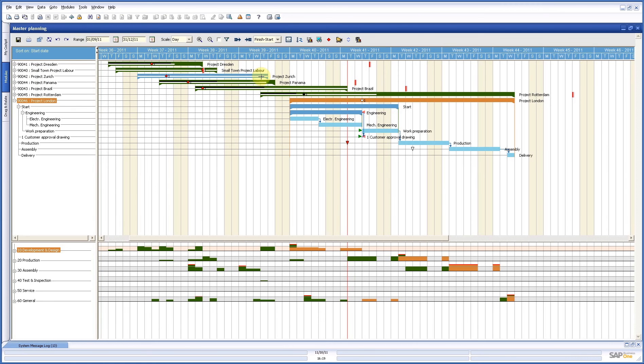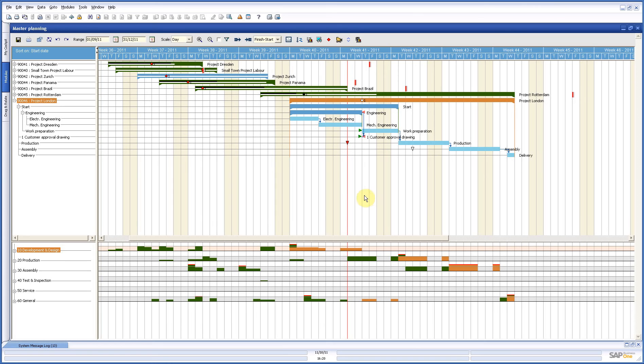You see the same here on the right where in this screen this thin red line is today. And these thick red lines are the promised delivery dates to customers. So those lines are very important.